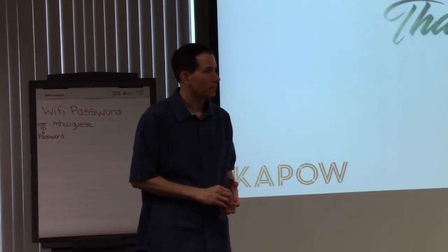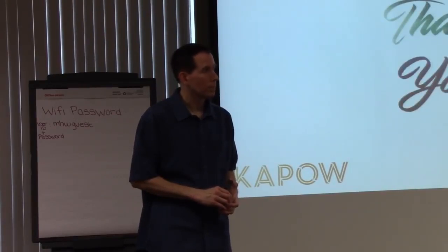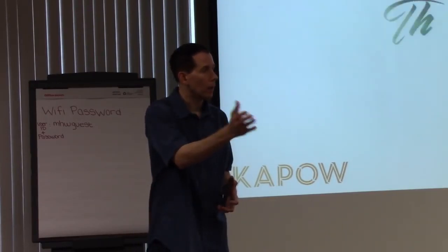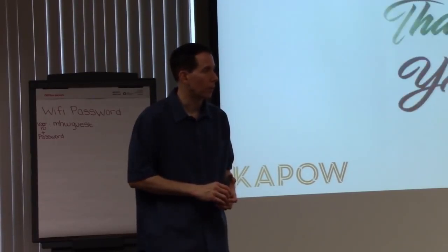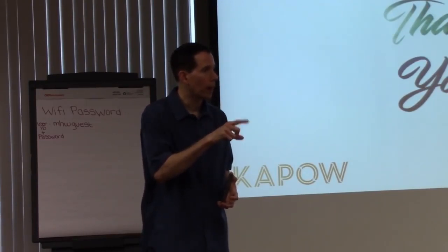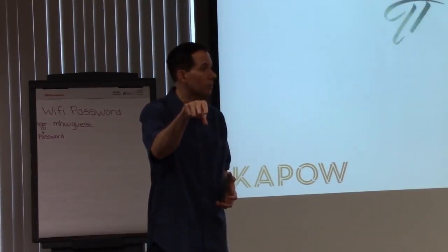Yeah. And I'm wondering, are there reasons against that, or did you just decide to, it sounded like, make your sprint 2 weeks and front load those tasks in the early part of the sprint? In the early part of it, yeah, and for that reason, so we give ourselves some architectural runway, as you call it in the Scaled Agile framework. So you want to create a runway. So we're actually planning for the sprint after it.